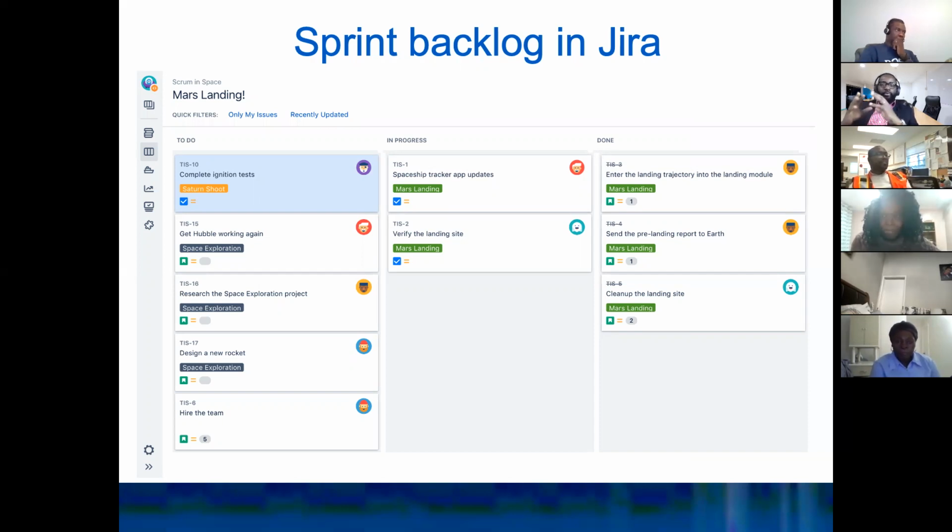So what big companies are trying to do is, when they have a project on which multiple Scrum teams are working, they create multiple sprints in advance, and they move sprint backlog items from the product backlog to those sprints. So they plan in advance, but they only start one sprint at a time because you can only work on one sprint at a time as a Scrum team, okay?